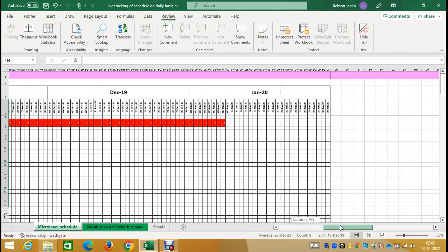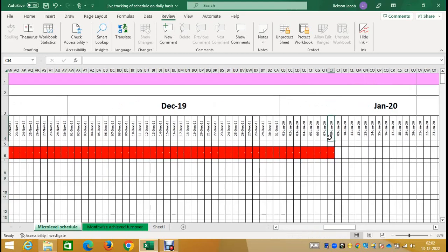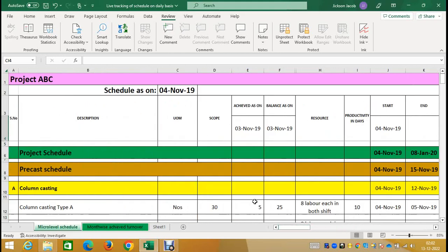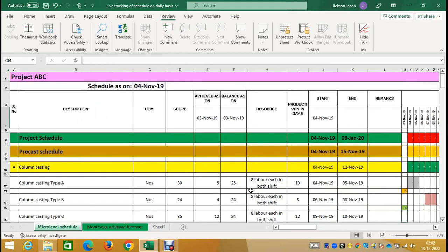And as we discussed, you can see the changes in the project completion date here. Before, it was 7th of November when we initiated the project on 3rd of November, and as of 4th of November, the project likely completion is on 8th of November. So it means that the project completion date has delayed by one day. The project is lagging behind by one day.